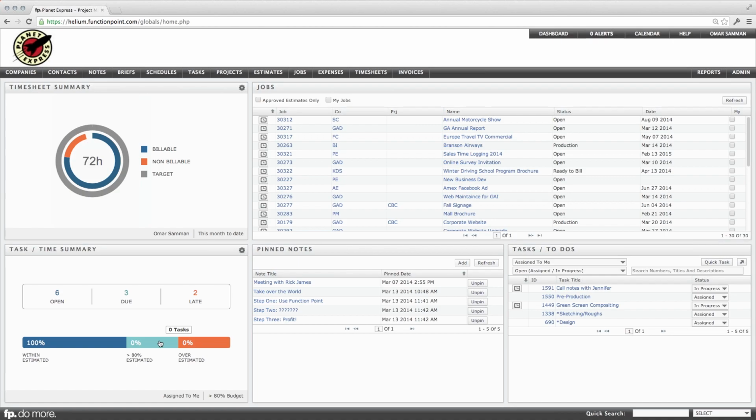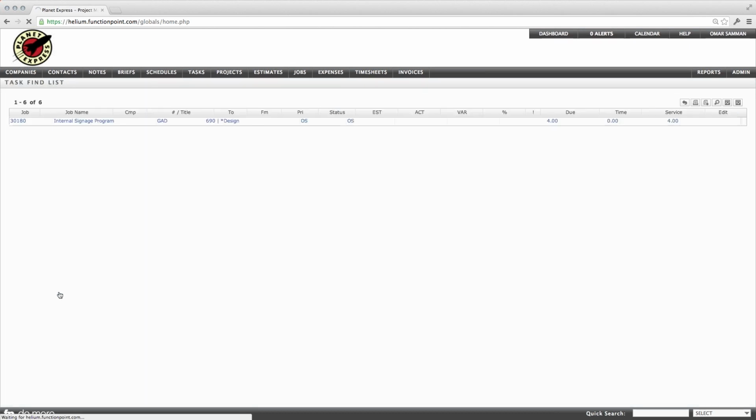So he's getting a little close to being overestimated or overdue on the task. And the last one, the red, is overestimated. So any time I put against that task, it exceeds the estimate amount. So if someone assigned me a task for 5 hours and I put 15 hours, I'm way overestimated. So I need to be careful there. And again, these ones, if you click on them, they will take you to the tasks accordingly.